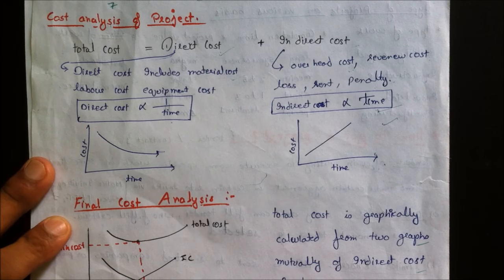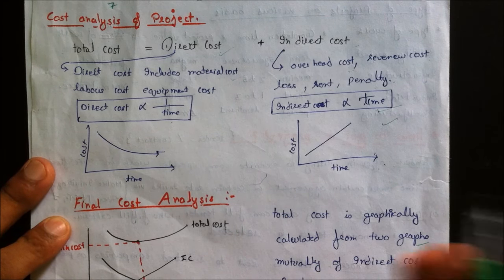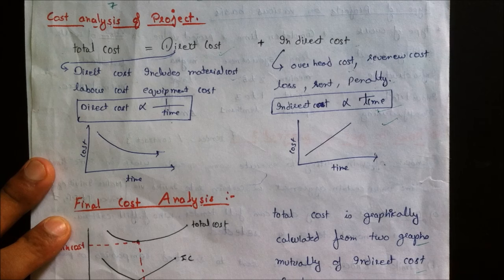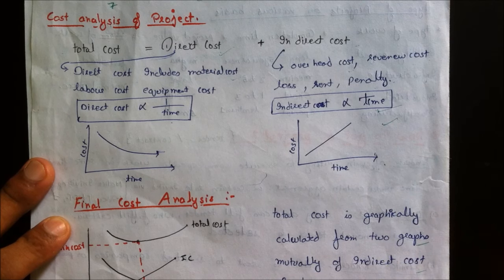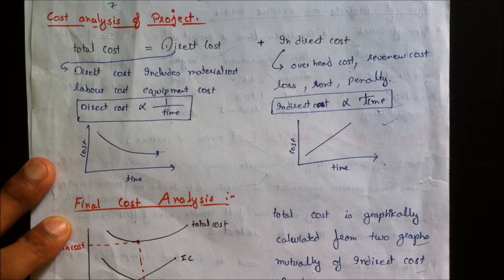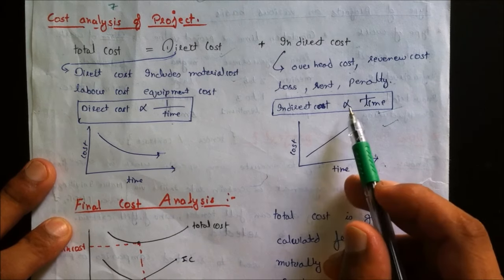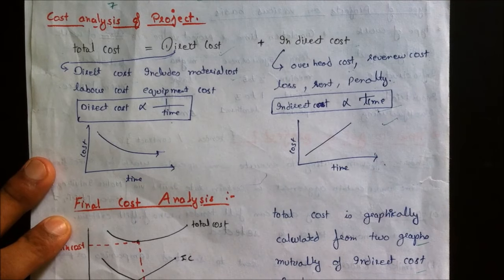Indirect cost includes rent, revenue loss, and cost of penalties over the project duration. For example, a temporary garage used for storage incurs rent over time. Therefore, indirect cost is directly proportional to time.